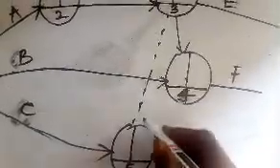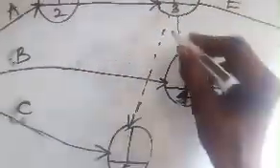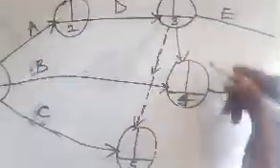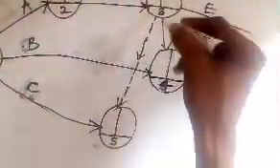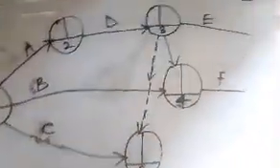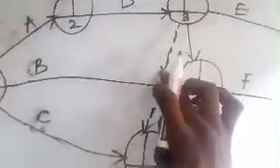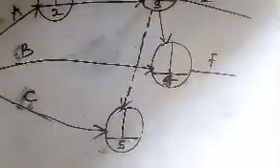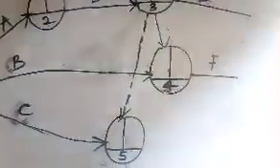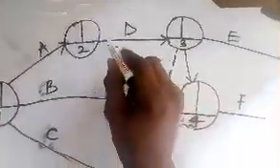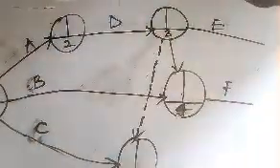So my C is here, and this is a dummy activity. Why is it a dummy activity? How will you know if it's a dummy activity? You will know when the node coming out from it is crossing. Dummy activity in real life sense has a 0 duration. How do you know if it's a dummy activity? Your same D activity stops here.